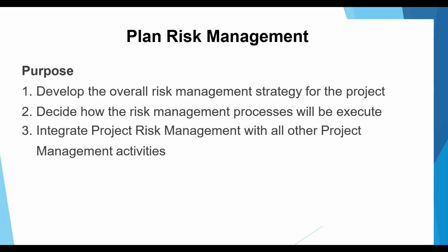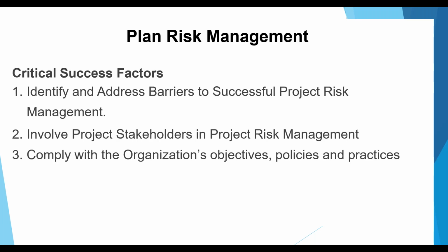Next slide, please. So in the plan risk management process, there are certain critical success factors. And the principal criteria for a valid risk management plan are acceptance by the stakeholders, alignment with the internal and external constraints on the project, a balance between cost or effort and benefit, and completeness with respect to the needs of the project risk management process.